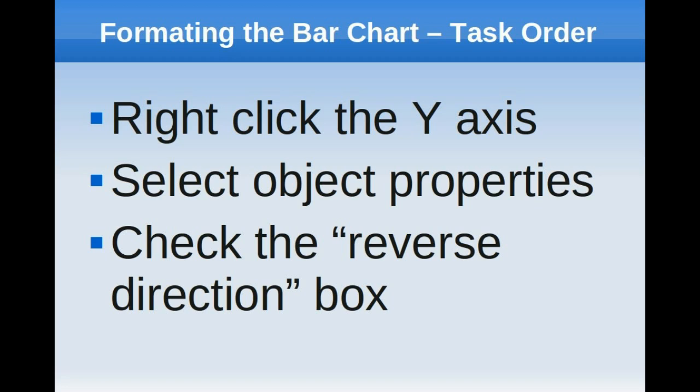To get the tasks in the right order, reading from top to bottom instead of bottom to top, right-click on the y-axis, then select object properties, and check the reverse direction box.